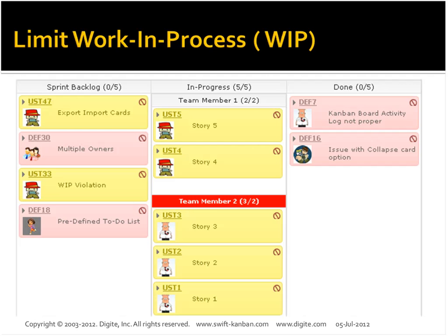So if someone else has to do the QA, they will suddenly realize that all 5 cards are now immediately coming to my queue for validation, whereas I could only process one thing at a time. So it sort of balances out. Limiting WIP balances out the overall queue or flow in the system, rather than causing spikes in different lower levels of the value stream.